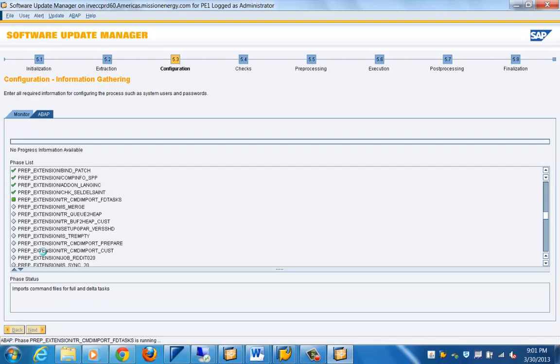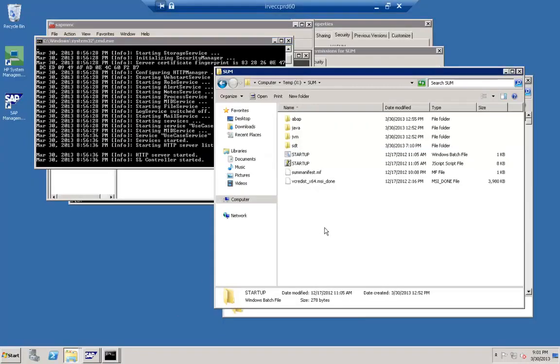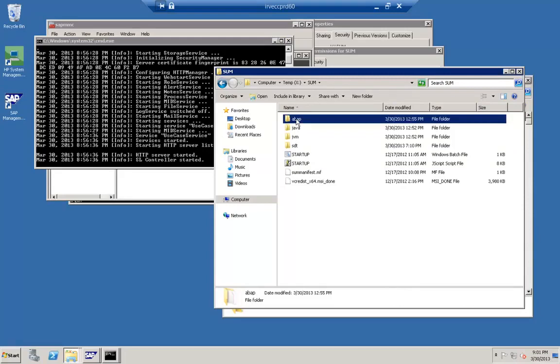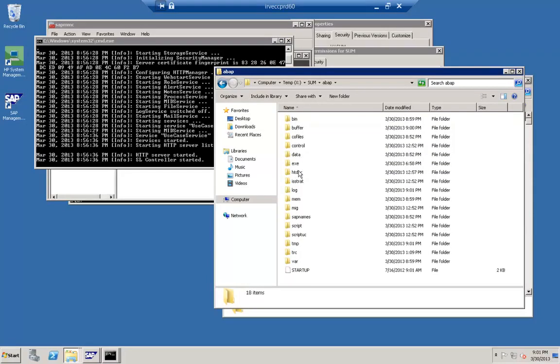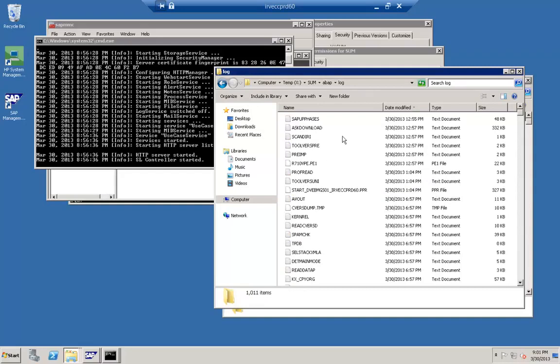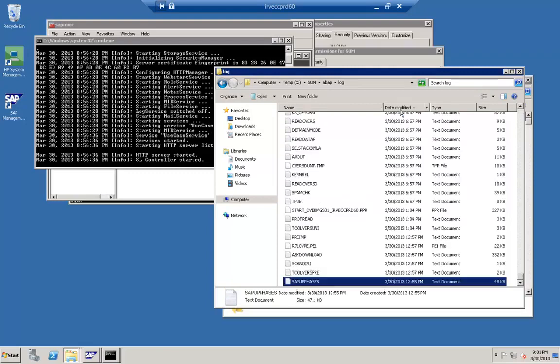Okay, but the bottom line is that we just need to make sure that we provide and review the log files on a periodic basis, just to make sure that we are keeping the upgrade in control. Because what will happen is that if we just leave the upgrade at the mercy of someone, basically we are not monitoring the upgrade, it will keep running and we may end up losing time because it may not be performing anything. And there are phases which take hours and hours, phases like act_upg, which can run for 24 hours at a stretch, and it may even go longer than 24 hours.